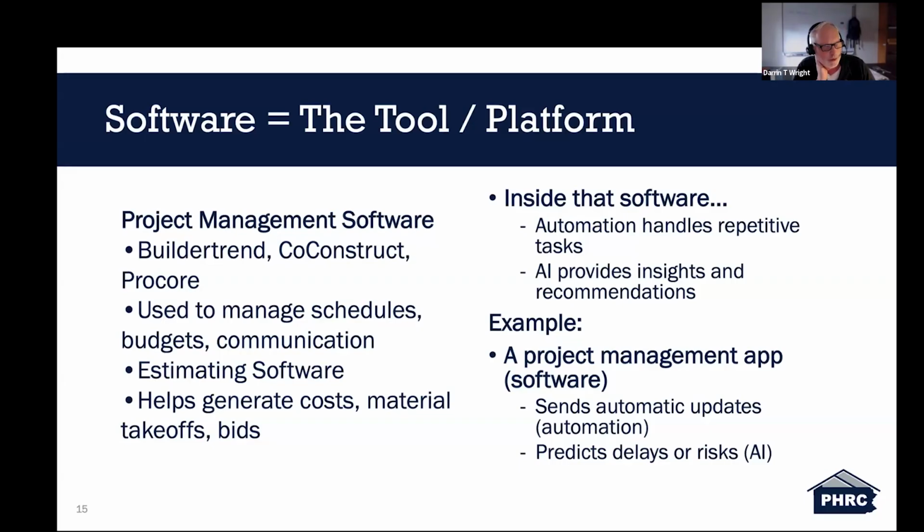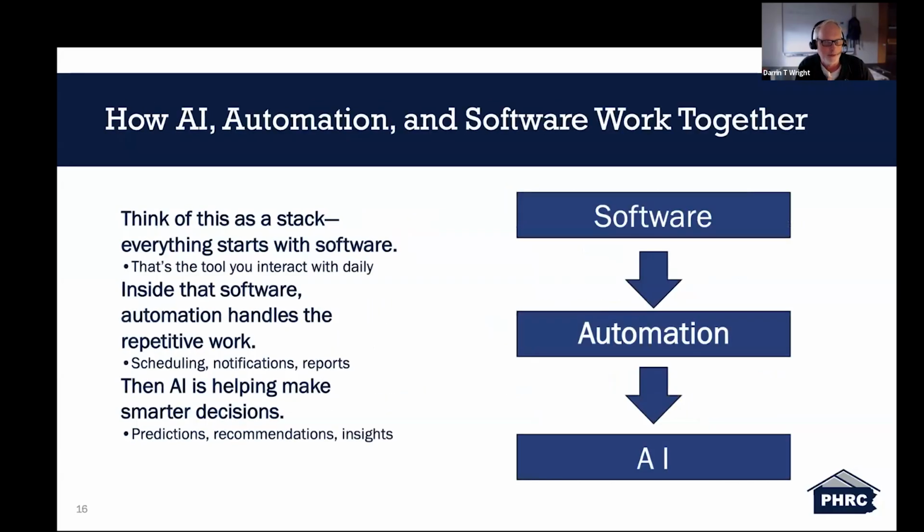This is useful when scheduling inspections or other things within the platforms. Some of these platforms will integrate weather forecasting into their software as well. So if you want to schedule an inspection, it might see that you have bad weather coming up that day. So it might make a suggestion that you might not want the inspection this day, or you might not want materials delivered this day because it is going to be rainy and wet. But ultimately it only makes these suggestions. You as the user will make the decision.